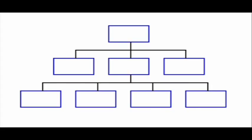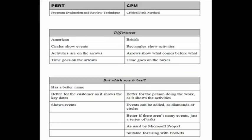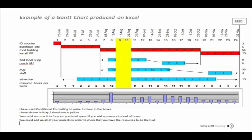Personally, I much prefer CPM. That's what Microsoft Project uses. It's more intuitive, I think. You can use post-it notes to do it in a really easy, convenient way. And also, you always have activities to do, but you don't always have events. The one snag with CPM is that it doesn't have milestones, but you can put them in at the Gantt chart stage anyway. It's important to note that whether you use PERT or CPM, you're still going to convert it into a Gantt chart sooner or later, and the Gantt chart will be the output that you want.